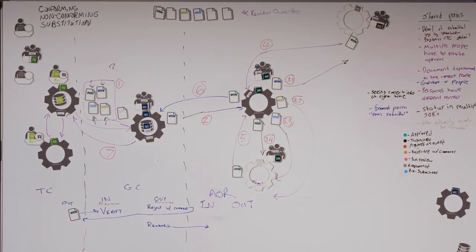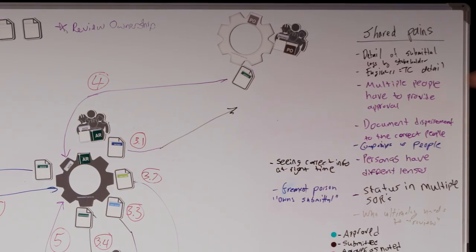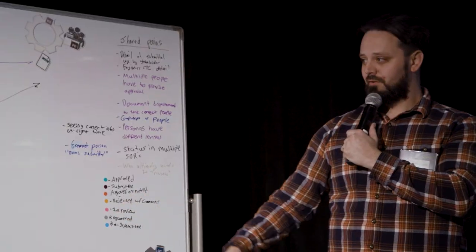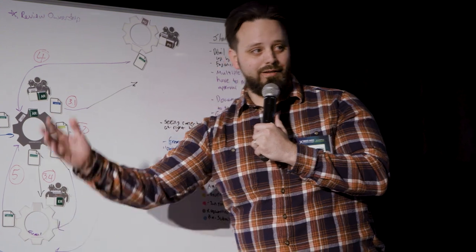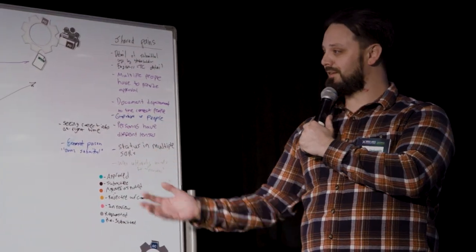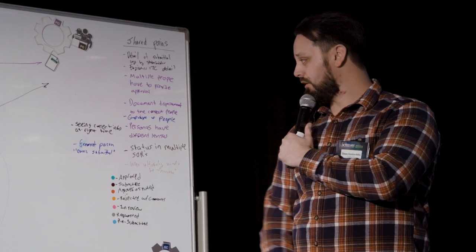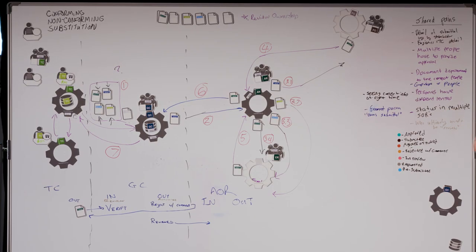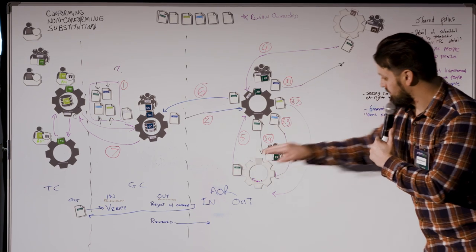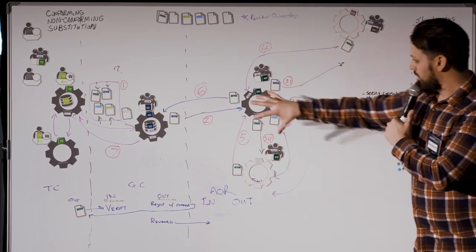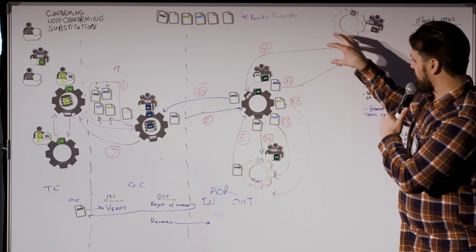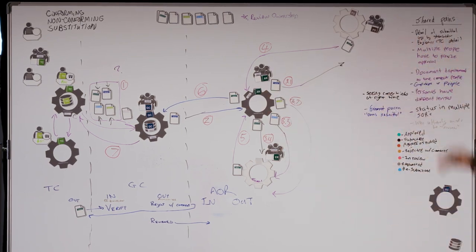Multiple people have to provide approval for one small document. Companies versus people is a big one — turning it into the right person matters. If you think you're submitting to the superintendent but it actually goes to a project engineer on their third day who has no power to approve anything, it may sit in someone's inbox and take a long time. Statuses are another pain: each piece could have a different status, every status has its own system of record, no one has one overall view, and each system of record is likely out of sync with the others.